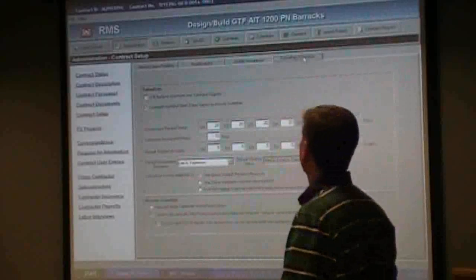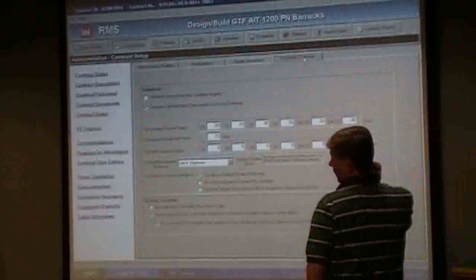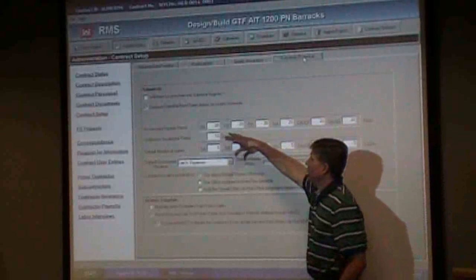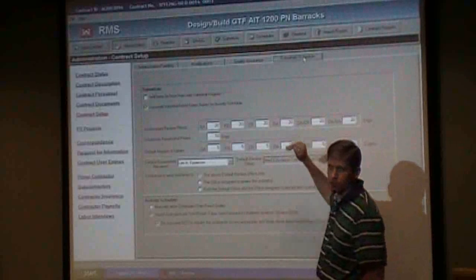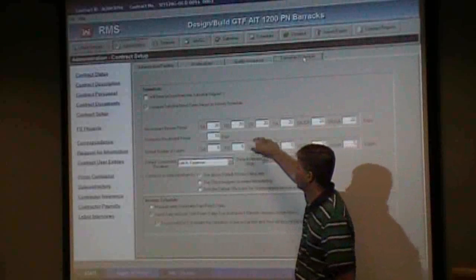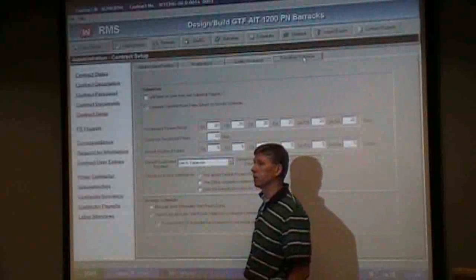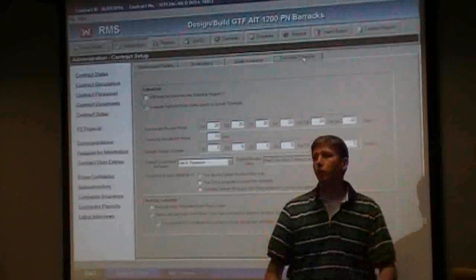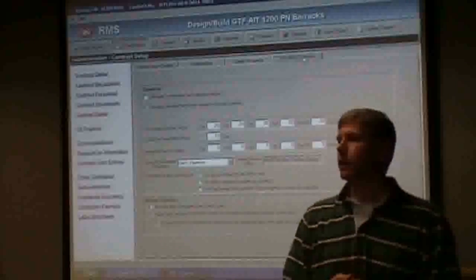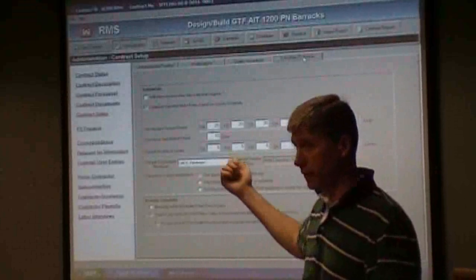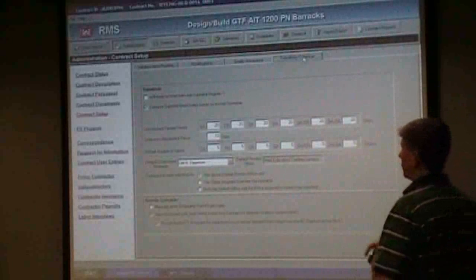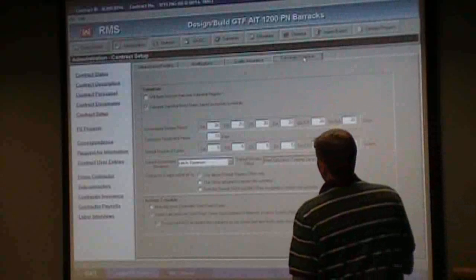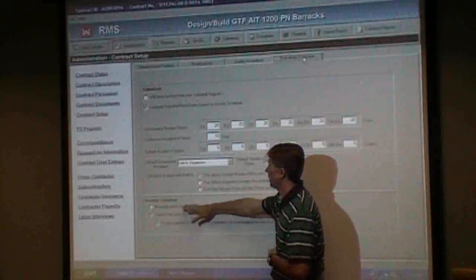The next one here is submittal and schedule. And this one's filled out. Looks like it's filled out right. This is a block that you have to fill in. It's not something the contractor can fill in. You have to put in. This is the review period days for all these types of submittals. Now, the contractor, and like I told them yesterday when I was talking with them, they need to give you a goal for a resubmittal period because once we get into the submittals and items and all that stuff, they're supposed to link the submittals to the schedule. Well, that helps calculate that, having that number of days stuck in there. So, they need to tell you what that is, what their obligation is.